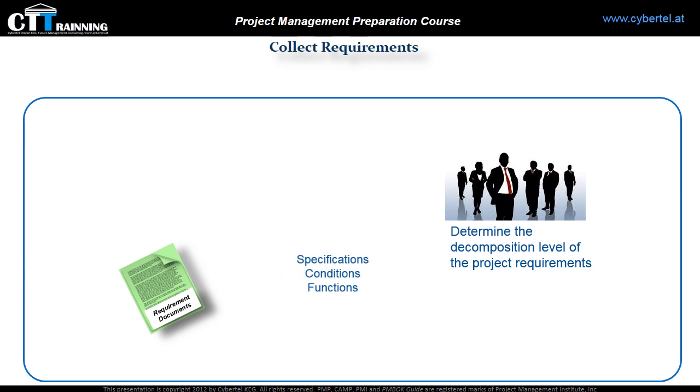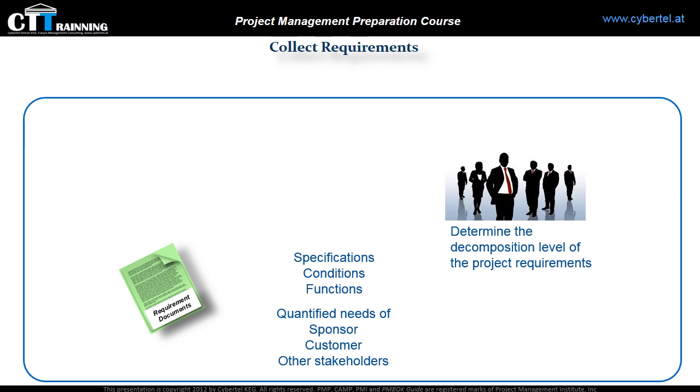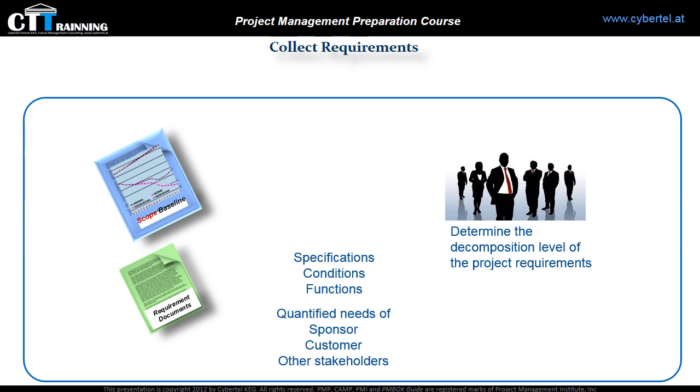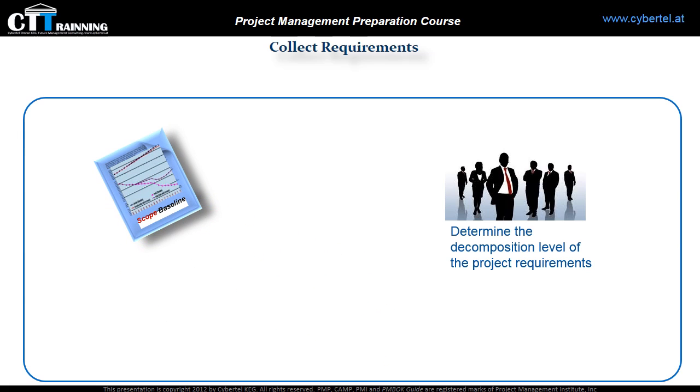Requirements include the specifications, conditions, and functions of the project deliverables that are stated in formal agreements. It includes also quantified needs of sponsor, customer, and other stakeholders. The project requirement becomes part of the scope baseline, which will always be monitored during the execution of the project, comparing the result of work done to the baselines.